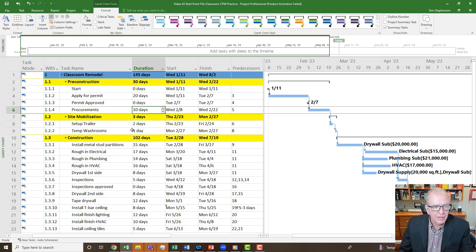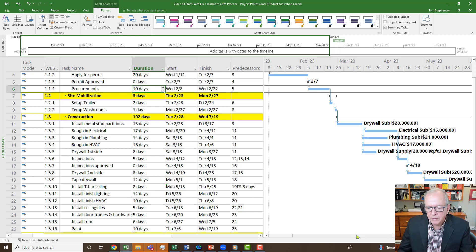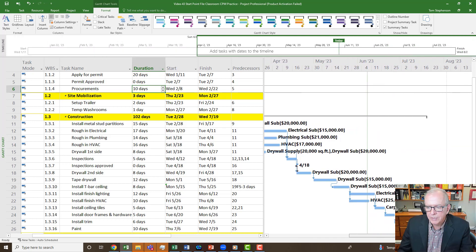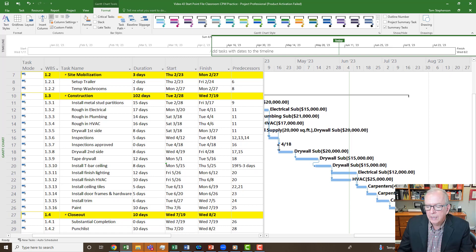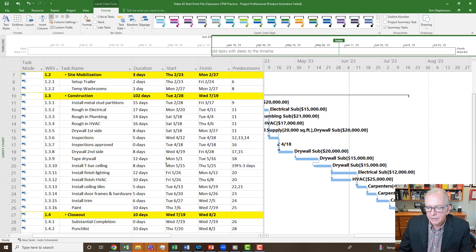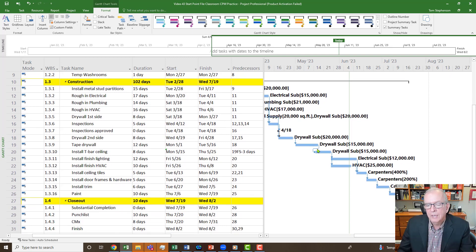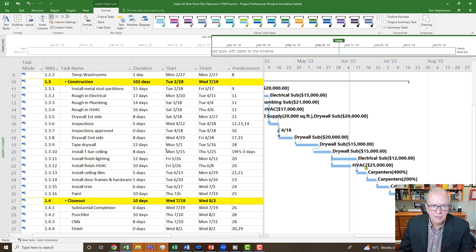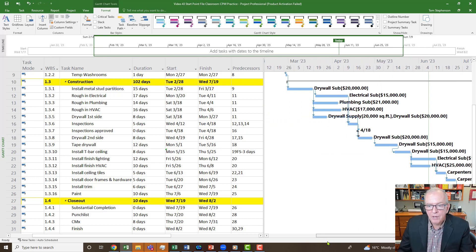I've got this file and it's a classroom remodel. I've colorized the work breakdown structure and it's fairly well developed and about ready to be set as a baseline, but I don't see a critical path here. The critical path is the longest path through the network of activities that will complete the project in the shortest duration.